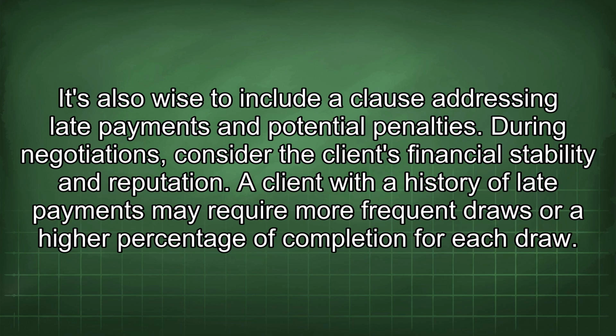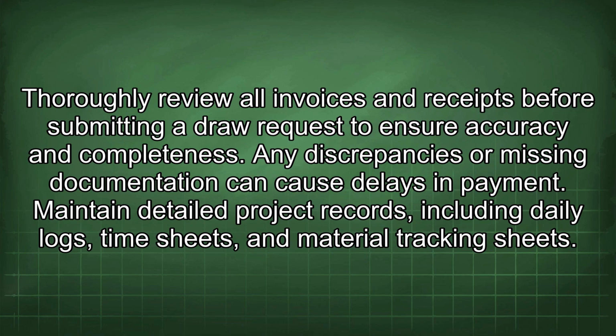During negotiations, consider the client's financial stability and reputation. A client with a history of late payments may require more frequent draws or a higher percentage of completion for each draw. Thoroughly review all invoices and receipts before submitting a draw request to ensure accuracy and completeness. Any discrepancies or missing documentation can cause delays in payment.